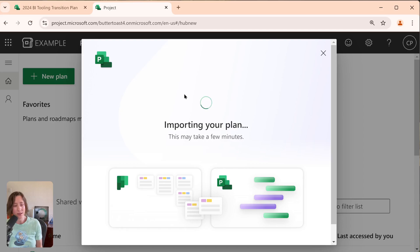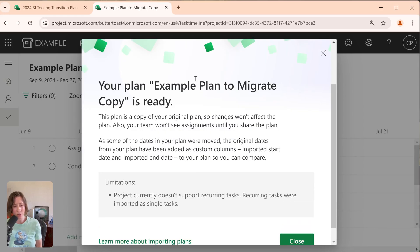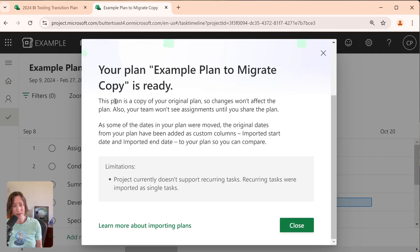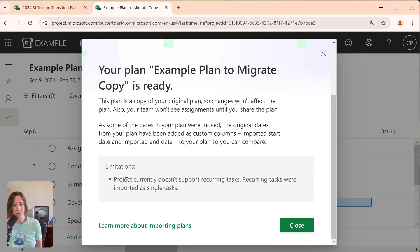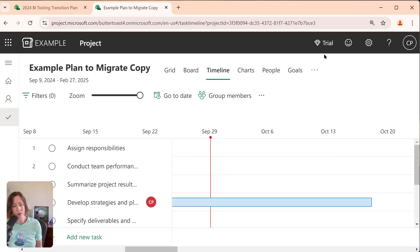The one thing I will say is that the recurring tasks do not stay as recurring because that's not a feature in Premium Planner. So it does say that when you're importing it here. So it doesn't currently support recurring tasks. It does, however, get, if I go to the grid view,